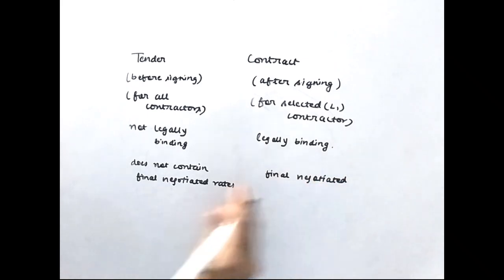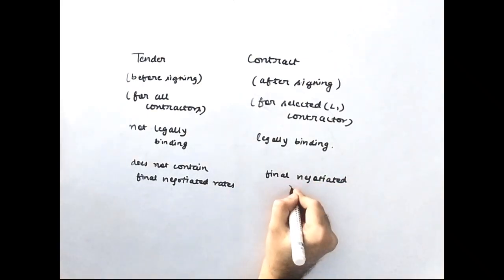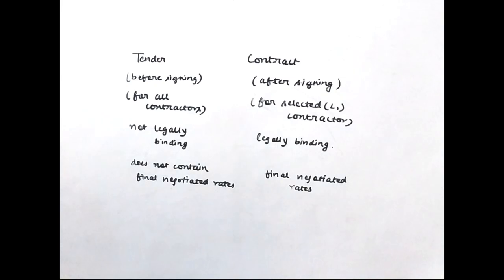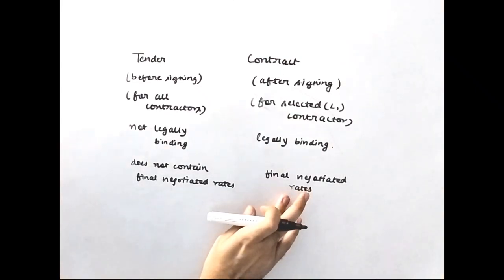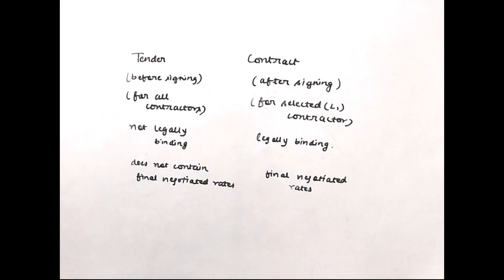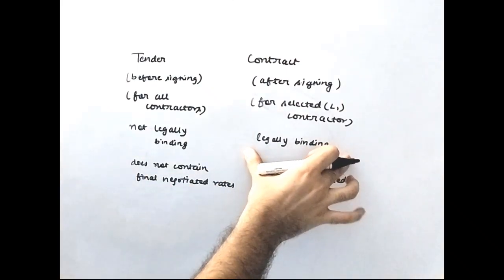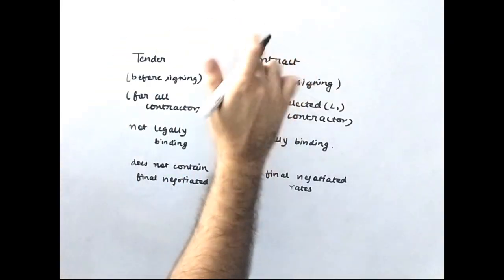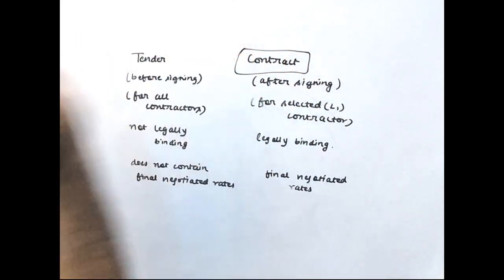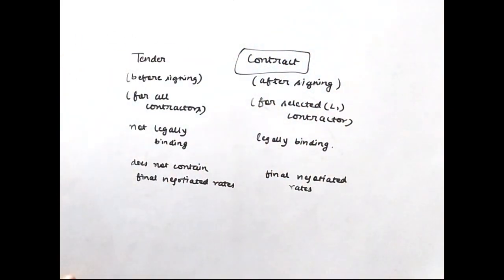The tender does not contain the final negotiated rates — it will just contain the quoted rates. The contract, however, will clearly mention that it is signed between the client and the contractor for a contract value of, say, 100 crore rupees. After it becomes a contract, it will be legally binding, meaning the contractor is bound to perform as per the specifications and quality and safety standards mentioned in the document.